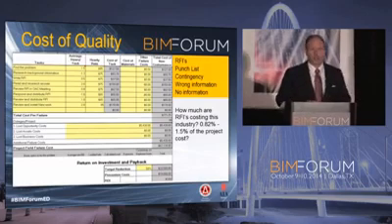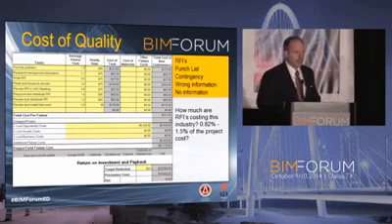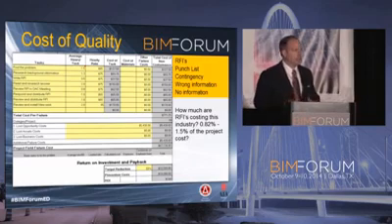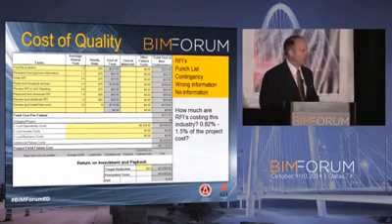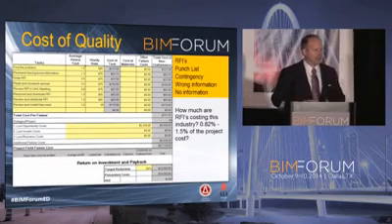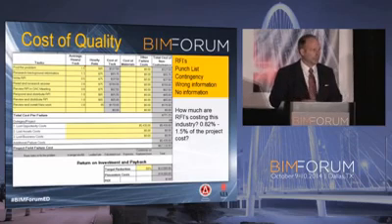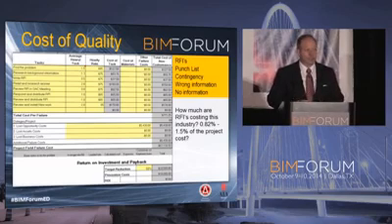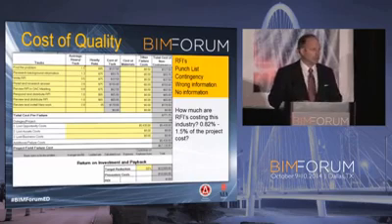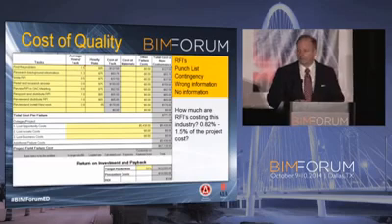I wanted to cut them down. In my study, we started looking at an RFI that doesn't really affect anything, but just the processing time of it was $771. When you really start to think about that, think about the math on your job. I looked at Turner, $7 billion worth of projects that we did samples on. That number, if you take total project cost, started to come out somewhere between 1.5 and 0.8%. For those of us that are general contractors, that's some serious money.